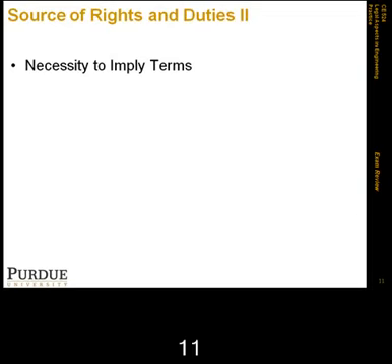And we talked about, in this case also, a group of obligations that could be implied, and sometimes employed by the courts. One of them, for example, is the duty to cooperate between parties, which includes the duty to refrain from negative action, but also sometimes going further, there may be an implied obligation requiring performance of certain positive actions that prevent the loss of others.